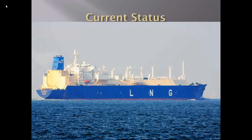The discussion on the host government agreement, with a focus on the fiscal, legal, and regulatory framework for the project, will have to give Tanzania 10% of the liquefied natural gas, while the remaining 90% will be sold in exports. Talks are ongoing, but there is concern that they have taken so long, as a result of some disagreement, change of regime, change of laws, and other factors which have delayed the process of making the final investment decision. The other phases include the construction phase, but this will be done once the HGA has been signed.